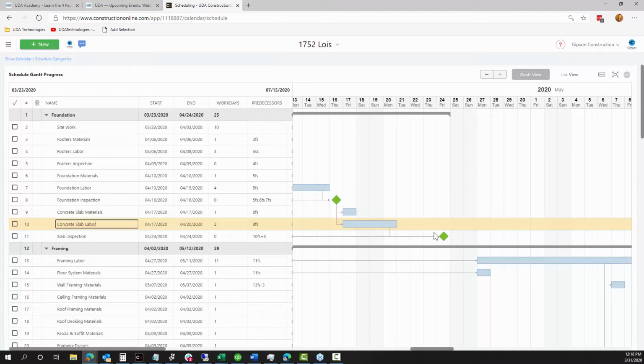Well, exactly. And you have just a ton of flexibility to get that done and create those relationships. And that kind of goes back to creating that first pass where you go through, and then once you've decided, that can then be templated out if those relationships will always exist in more or less the same way. As we see often, we know that the concrete slab is always going to need a little bit of time to cure, so that makes sense that you would have that.